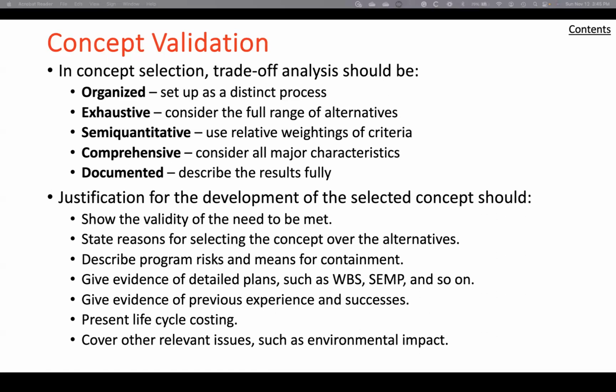The system requirements should always be regarded as flexible up to a point. If the validation or trade-off results show that one or more stated requirements appear to be responsible for unduly driving up system complexity, costs, or risks, they should be subjected to critical analysis and, if appropriate, highlighted for discussion with the customer by program management.